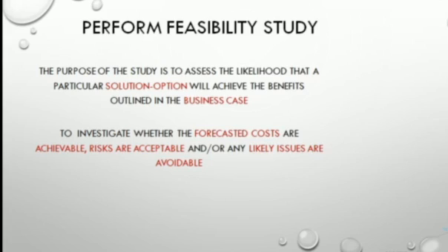One of the ways to do the feasibility study is to carry out a forecast of cost. You understand? Forecast the cost that you'll be using to carry out this project and know if it is something that you can afford. Another reason to forecast the cost is that when you forecast the cost of the project, you can then compare it to the potential benefits that you are to make from this project and see if the benefit outweighs the cost, you understand, before you know if you have to embark on the project.